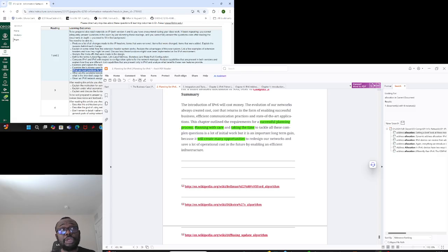For example, even though some vendors could tell you that the device supports IPv6, it could come with a license where you have to buy the license to deploy IPv6 fully end to end. So you want to leverage that to have discussions with your vendors to foresee if the equipment is ready for IPv6. You want to evaluate your vendors, your products, and your service providers.